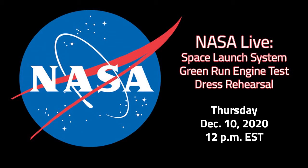So the plan for the start of the hot fire test right now will be towards the end of December, and this will support delivery of core stage from Stennis to KSC in February of '21. This is the first time we've tested this core stage, which is going to fly on Artemis 1. So we are going to take every opportunity to ensure we get the most out of this test.